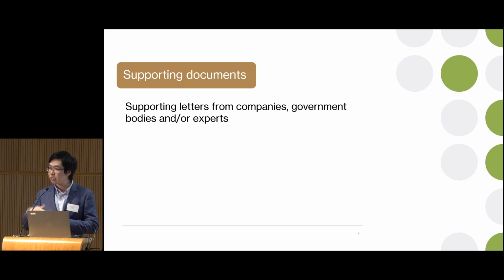For example, it takes us maybe a few weeks or even a few months to finalize the details of the supporting letters, as well as how we secure their signature. So we need to be well prepared in advance. Maybe we need to aim at having our proposal ready at least a few weeks in advance of the official submission deadline, because it will give us some buffer so that we can have some contingency action.